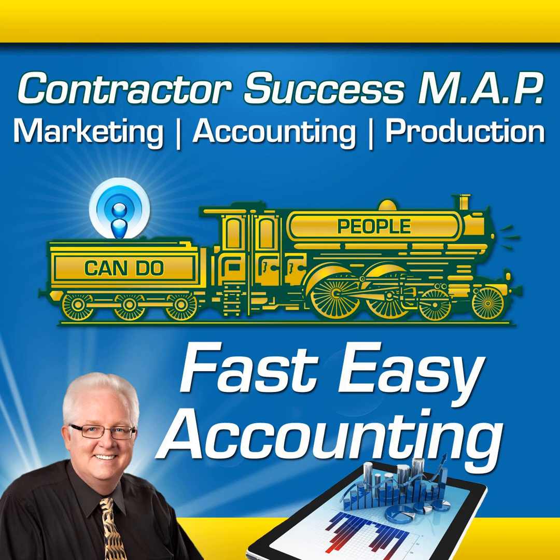Final payment, when the work is done. When you prepare the final invoice, you will credit back the deposit and either issue a small refund check or collect a small check.